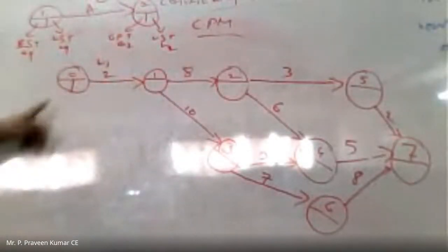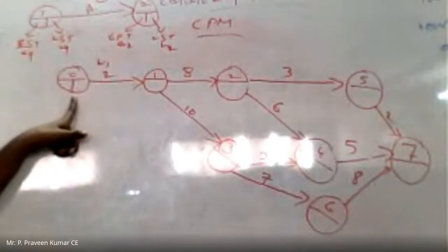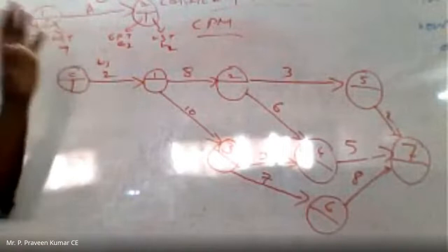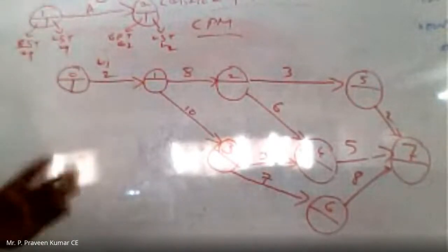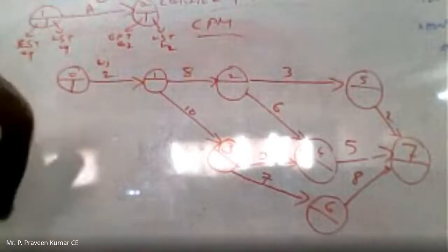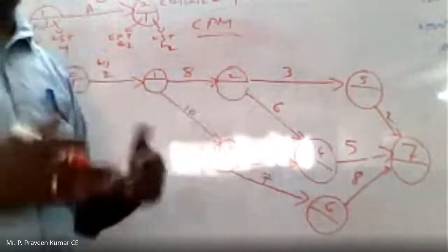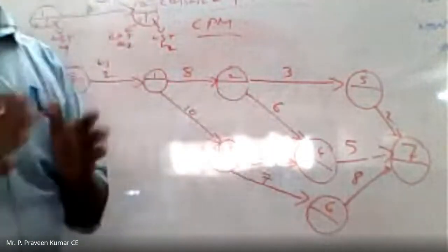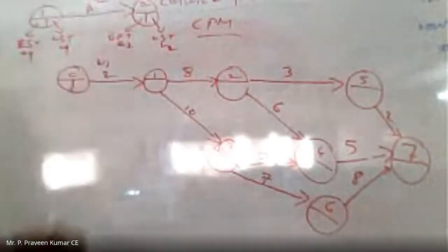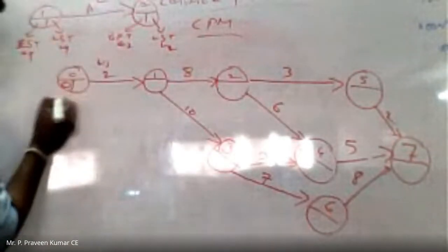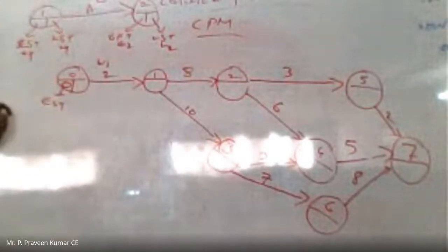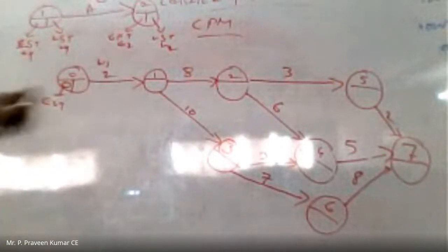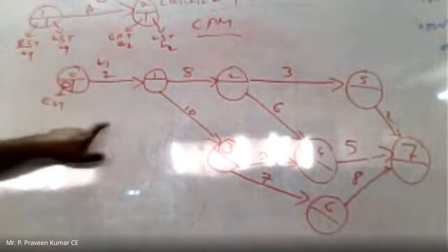Okay, now coming to the starting of this project. Whenever we are starting the project, the earliest starting time will be 0. We are starting the project without any time, so for that purpose the starting time we take is 0. That is the EST. Now the earliest starting time for this project is 0.